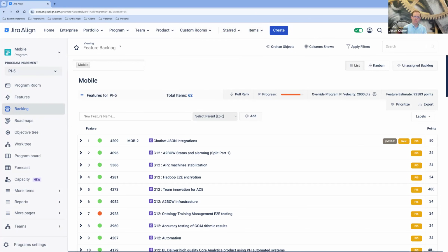The teams in Jira then take the features they're assigned, break them down into stories, estimate those typically with story points, and put them into sprints set up in a given PI. They work those sprints, 2 or 3 weeks, however long they are, delivering stories meant to ultimately deliver those features.